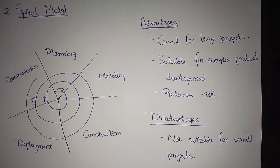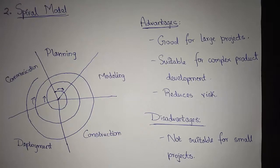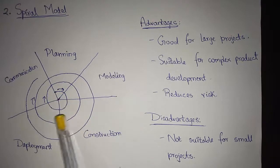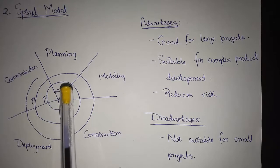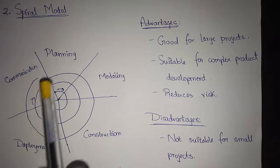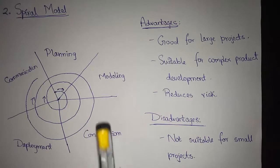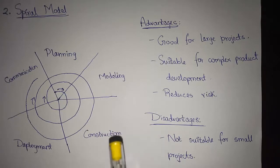Here, software is developed in a series of evolutionary releases. In early iterations, we are releasing either a paper model or a prototype model, then we develop the complete versions of the software. Beginning at the center, we move in a clockwise direction. At each revolution, we consider the risk. The main focus of the spiral model is to identify the risk at each revolution, along with identifying the work products and conditions at each revolution. These are called anchor milestones.